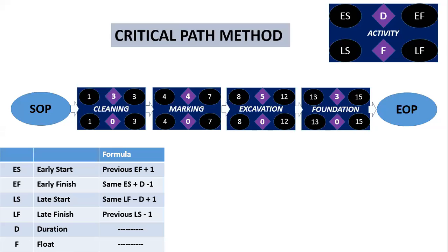Now we are at the activity cleaning. How to calculate early start? Previous early finish. What is the early finish of SOP? 0, right? 0 plus 1 goes to 1. Exactly. That is, the early start of cleaning is 1 day. The first day of the project begins with cleaning.